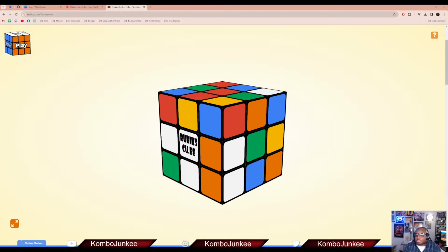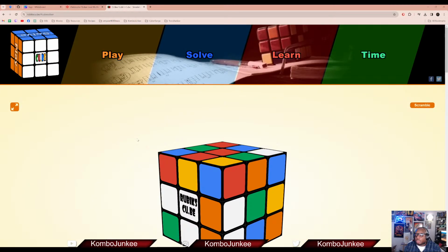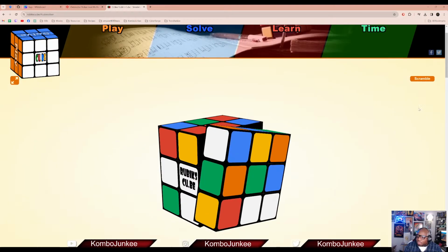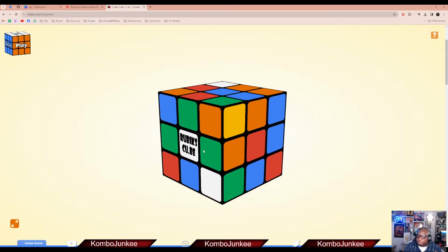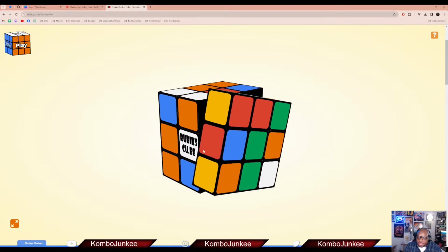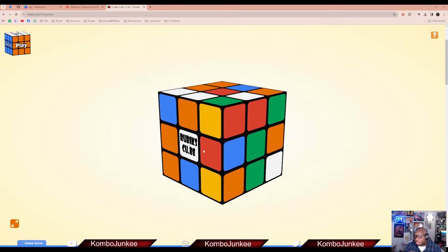In the case of this website, I may want to use Scrum to create a scramble feature that allows me to say, after this work is done, you'll be able to click this button and this cube will scramble. Okay? In the Scrum process, we have ceremonies, five of them to be exact, and each of those ceremonies contributes to a developer's workflow to get that end state in place, right? So you have your backlog refinement, which is you grooming stories, saying, hey, if you want to do the top layer, here are the development things you need to do.